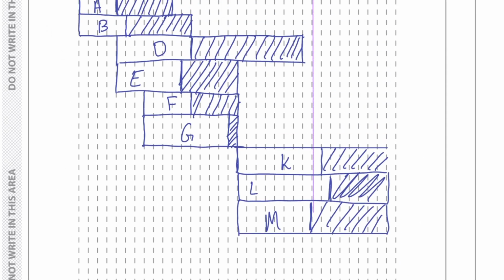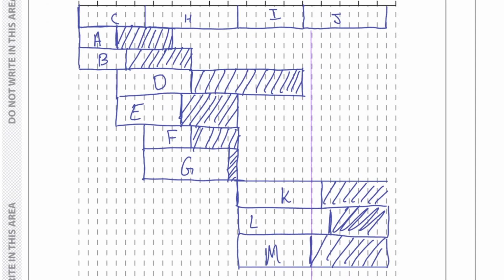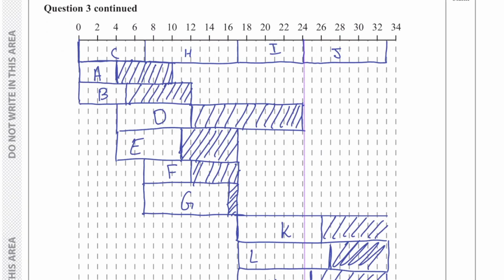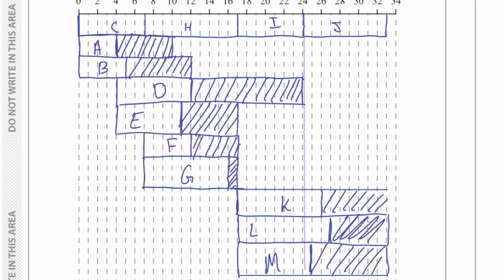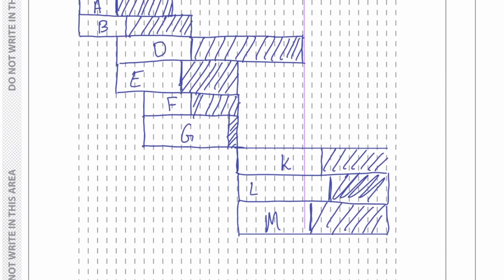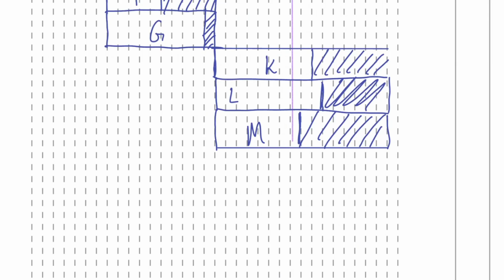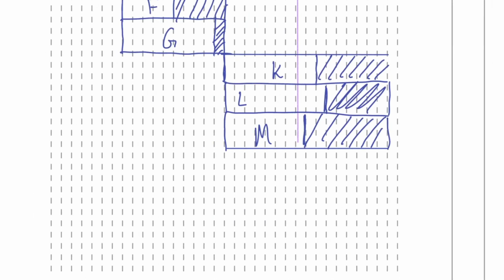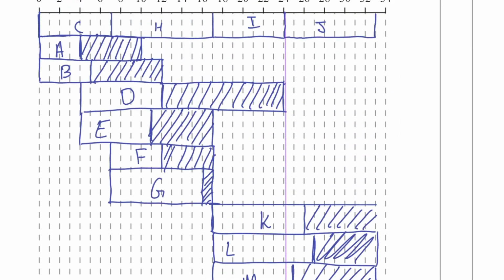Okay, so if you guys are not good at it, I'm just going to do it one more time. So we want to draw a line. You guys can use a ruler, since you cannot draw a line or move it. So you want to check how many activities must happen at that time. So at 24, we have 4 activities happening: J, K, L, M. Oh, we can use 24 as well. Even if you shift M to the right, it's still going to be showing. So even if we shift M, it's still going to happen.